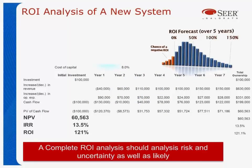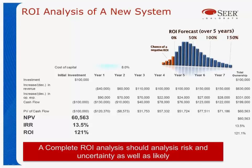Another example of return on investment: the study showed people both underestimate the costs and overestimate the benefits. Using traditional definitions of return on investment, net present value, and internal rate of return can help. In this example, a system has a net present value of $60,000, spending $100,000 with total revenue of $600,000 — an internal rate of return of 13.5%, and a 121% return on investment. That sounds pretty good. But if you apply risk, we see a different story where the return on investment may not be as good. Applying these techniques to both cost and benefits is really important in making viable business decisions.